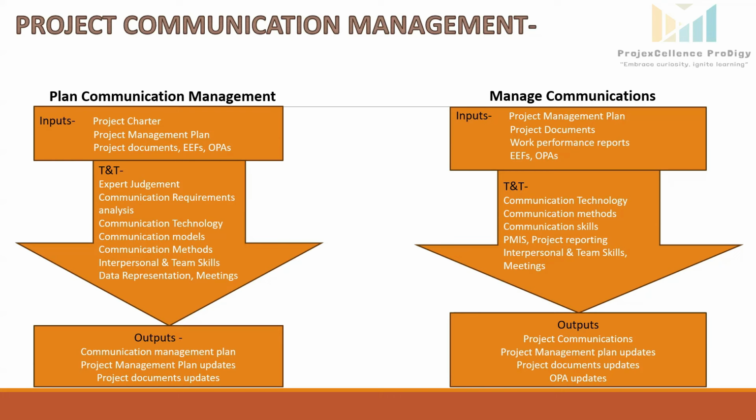Project management plan updates. Communication management plan will be updated if communication strategy changes. Stakeholder engagement plan will be adjusted based on the stakeholder feedback. For example, suppose in our project local authorities request additional environmental impact updates, so the communication plan is revised